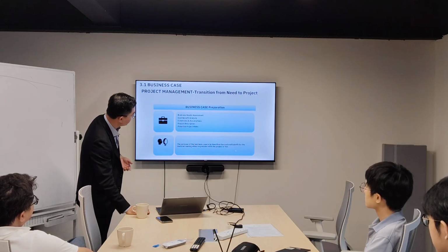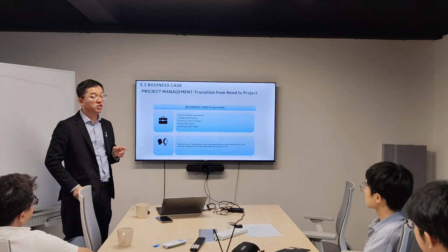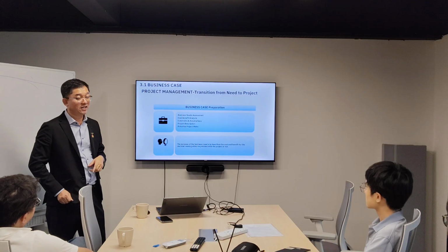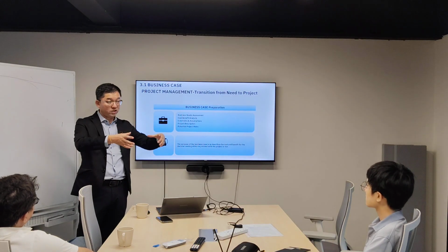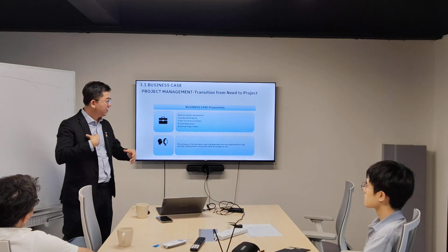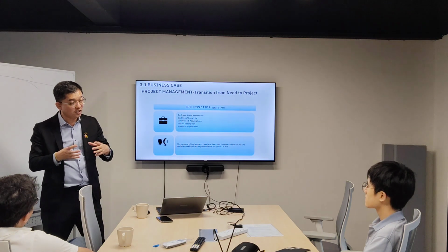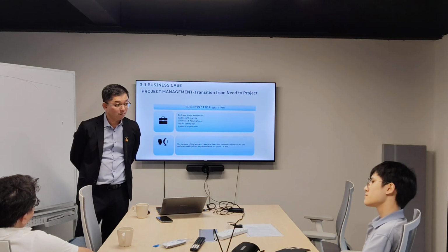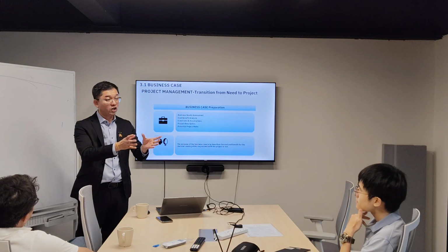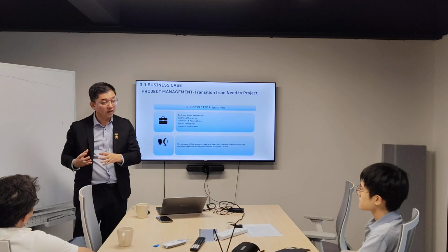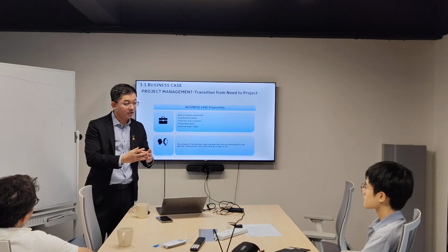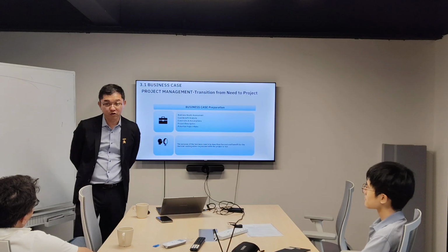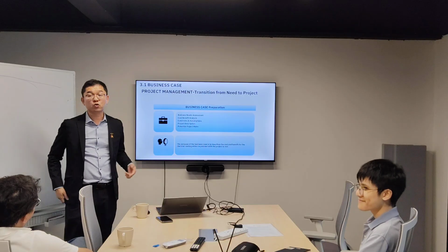Okay. It also says the purpose of the business case is to describe the cost and benefit for the decision made either to proceed or not. Example, you want to construct this project, the cost is 100 million. Your money is only 80 million. You still want to invest? Meaning that the cost that you spend is 100 million, and the total return that you get is 80 million. Actually, you're losing 20 million. You still want to invest?